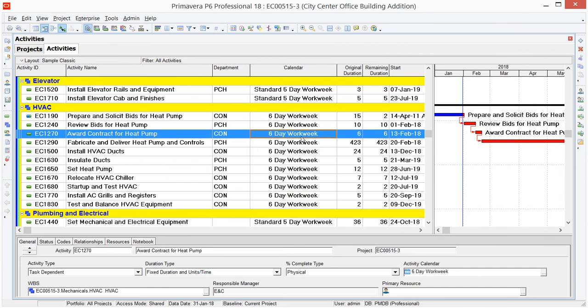Now if I had automatic scheduling on, I would see the results of that date-wise right away. If I didn't, I'd have to recalculate my schedule then to be able to see where my new dates land. Super powerful, that's Fill Down, a quick and easy way to streamline assigning activity code values or changing field data in P6 for multiple activities at the same time.